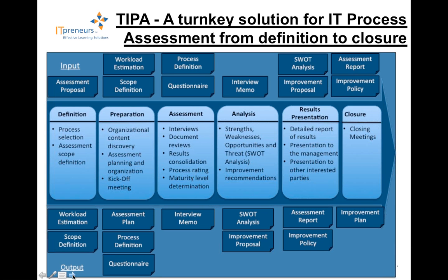And that drives us to the second phase, the preparation phase, where we'll dig into more details in the organization and discover the context a bit more in detail so that we can brief our assessor team and make sure that they're all understanding the same way the organization and the project that we have to do, and then start the assessment planning. So, fine-tuning of any of the tools that come with TIPA to facilitate the conducting of the assessment. And as with the first phase, you can see the input and output that come out of this phase.